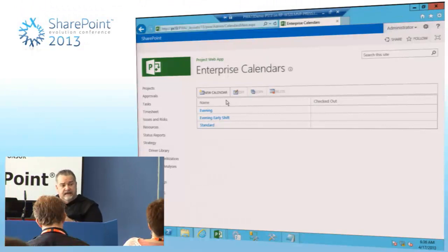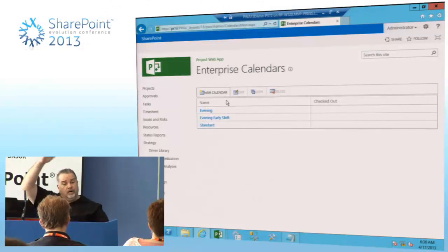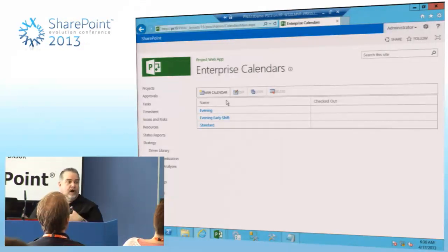Not anybody else has that. Then instead, I'm not going to create an enterprise calendar for Joe. I'm going to create an exception as a resource, and I'm going to modify his workday, not the entire calendar. You don't want a whole long list of calendars here, because you have more chances of having a problem in the future by a project manager selecting the wrong one.